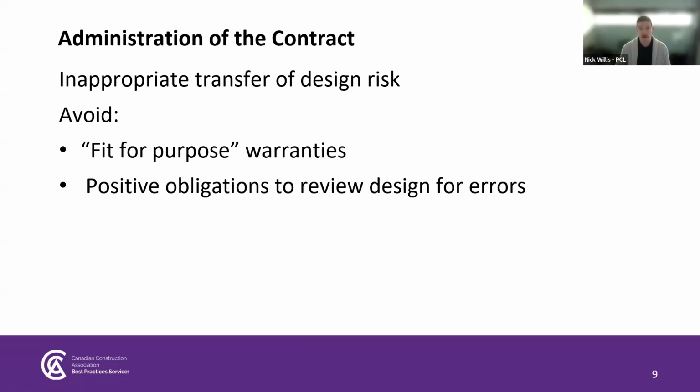Thanks, Bruce. So let's move on now to discuss the administration of the contract. And we'll get started by talking about design risk in non-design build contracts. So simply put, contractors should avoid terms that attempt to transfer design risk to contractors in non-design build projects. This is because contractors are not able to effectively manage design-related risk where they are not responsible for the project's design. This also creates a risk that the contractor will be required to pay the costs of fixing design-related issues as well.